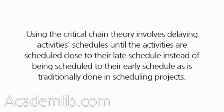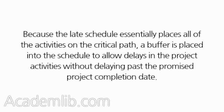Using the critical chain theory involves delaying activity schedules until the activities are scheduled close to their late schedule, instead of being scheduled to their early schedule as is traditionally done in scheduling projects. Because the late schedule essentially places all of the activities on the critical path, a buffer is placed into the schedule to allow delays in the project activities without delaying past the promised project completion date.